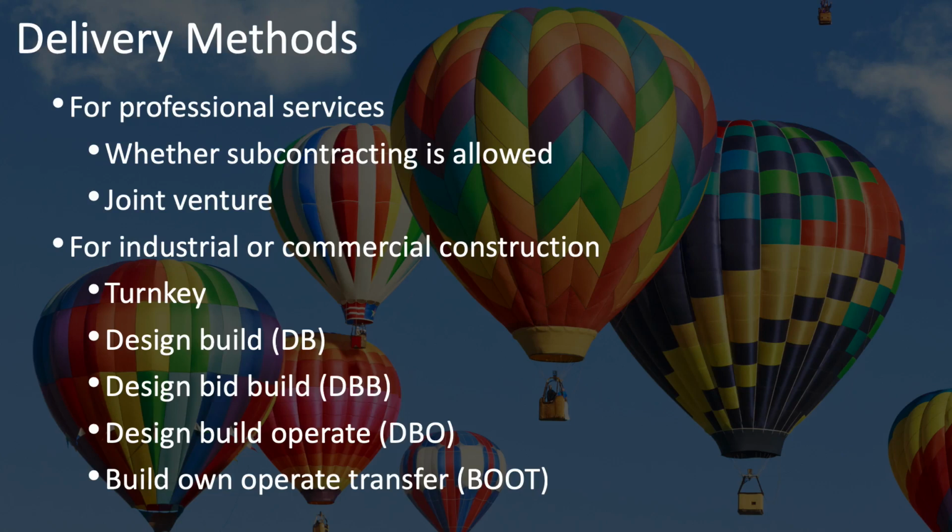On the other hand, there are also some risks to these types of long-term relationships you get with design, build, operate, and build, own, operate, transfer. In particular, you get locked into some long-term pricing as far as how you're going to share revenues. And so this can be somewhat risky, depending on how things change in the environment and the economy over this period of time. Because of these risks, the operator or provider may overprice this somewhat in order to try and shield themselves from these kinds of risks. Or, on the other hand, they may underprice it and end up going bankrupt and leaving you in a really difficult situation.